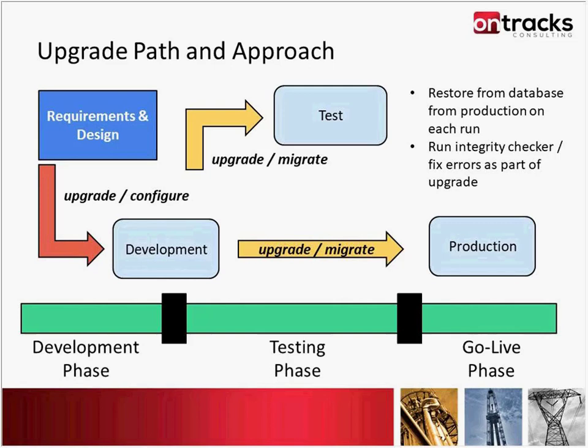From there, we perform this once more as an example. We do the exact same process in the test environment. The subtle difference is it's possible that we've done a bunch of configurations in the development environment for the overall project. So from there, we may want to migrate those configurations, maybe using the Migration Manager tool, from the development to the test environment. So this whole development and testing phase, you could do this multiple times.